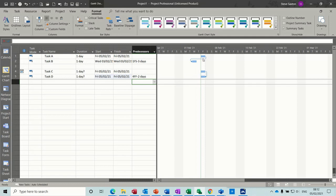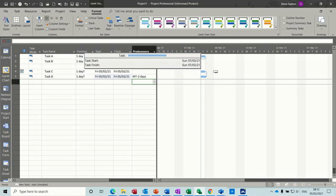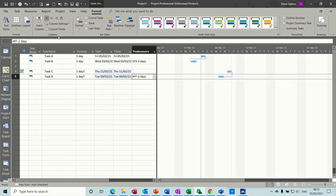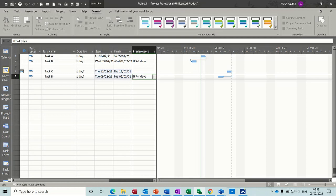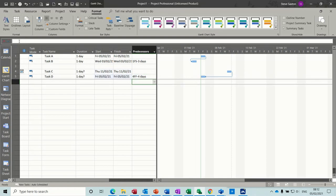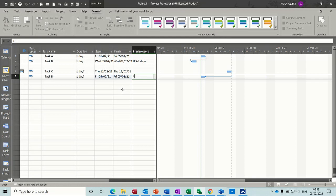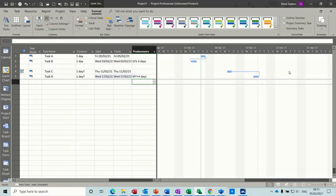Now, nothing seems to have happened because that's the start of the project, and it didn't go back. Even though this one did, what you have to do in this one, if I just push this one forward into next week, you can see it does the lead-in time. So if I click on that again and do the minus 4 days, it comes back to the start date of the project. And if I go 4FF plus 4, it goes the other way.